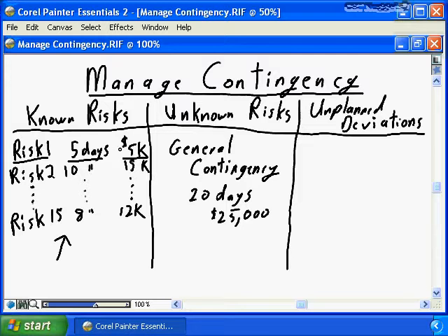If that risk event is going to occur in month 3 of your project, that 5-day contingency, that $5,000 of funding needs to be reserved, needs to be untouched until month 3 for the project, and the risk either materializes or the risk disappears. I want to stress this. Preserve the contingency for your known risks until the risk event occurs.